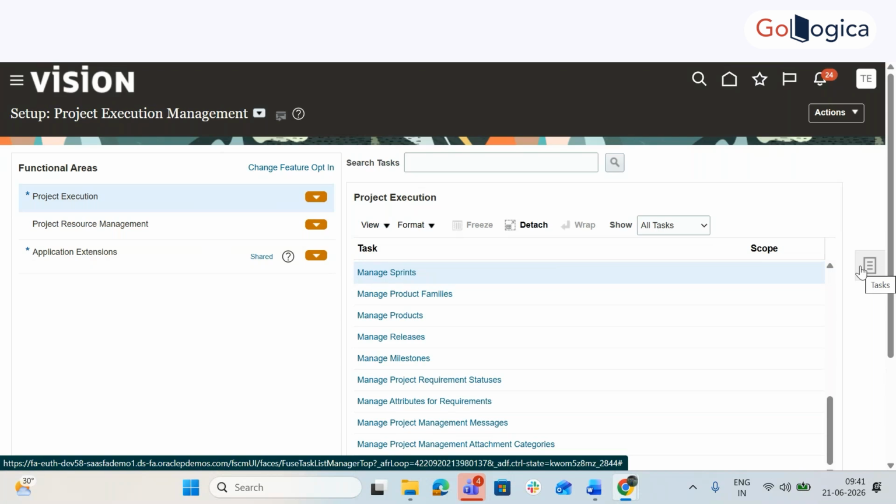That means doing the configurations, and you will show every cycle in the front end, like creating payables invoice, creating projects, creating deliverables. Everything you will show, and you will show it 3 times. First you will show, that is called CRP1. CRP means classroom pilot. Then the client comes to know, oh no, this is not the way we were telling you, this is the way we want it. You change it. Again there is a demo, and each cycle of demonstrating takes at least 2 months, because all the modules will come in.